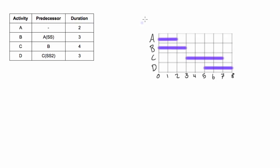So there we go that's our Gantt chart and you can see that the project, the duration of the whole project would be eight days.